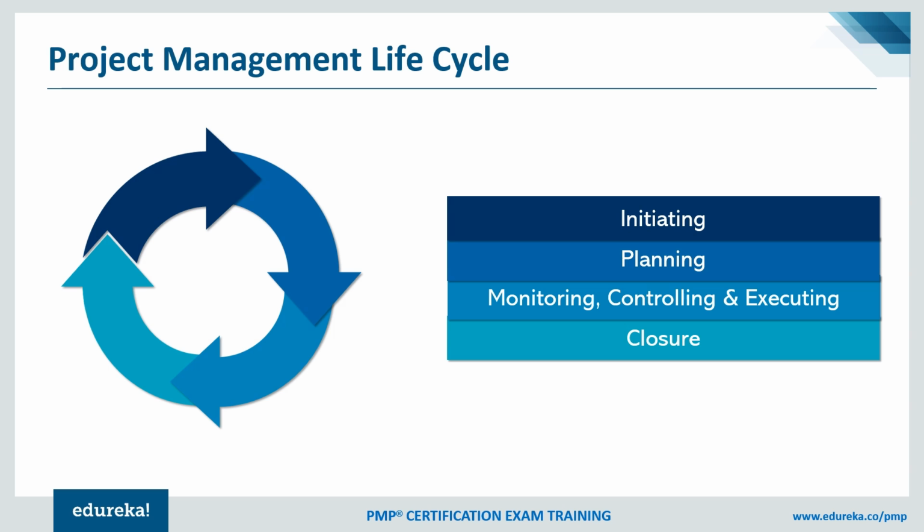And we would like to cross check our deliverables, our performance. And the reason for using the word phase gate is basically that it helps as a decision point. I would call that a go or no go. Should I proceed or should I terminate? That kind of decision is actually taken at that level. So at every phase gate, we have a choice to relook at whether things are getting delivered as they were desired or there is something to be done separately. So these are a few things to which we would pay more importance when we talk about project management life